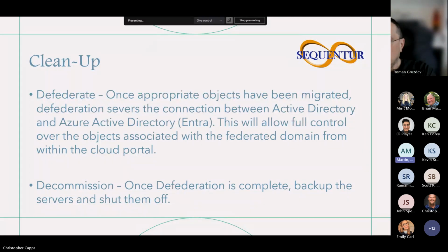Okay, and that's fine. Just the idea of how long it'll take in general. The change management obviously is going to be the most complicated piece, especially if we're talking about having to get users to reset credentials. So if we've got plenty of time to notify them and get them ready for it, that's ideal. If it was a 1 month process and we were just going to be springing it on people, that would be a bit of a concern. But 3 months doesn't scare me.